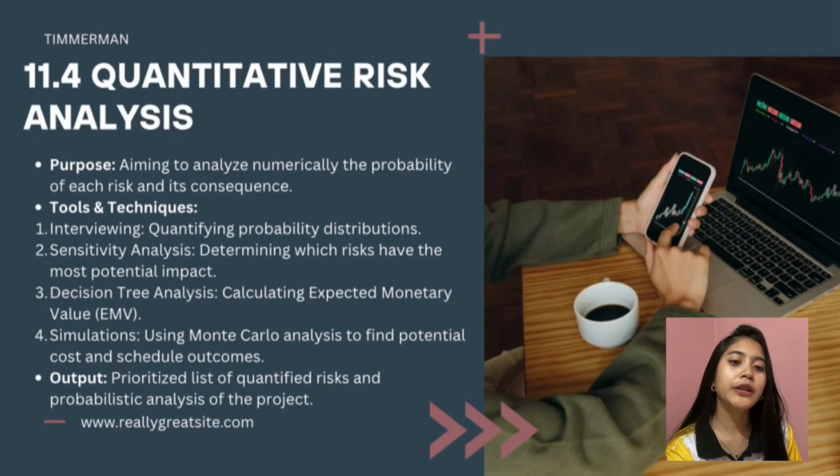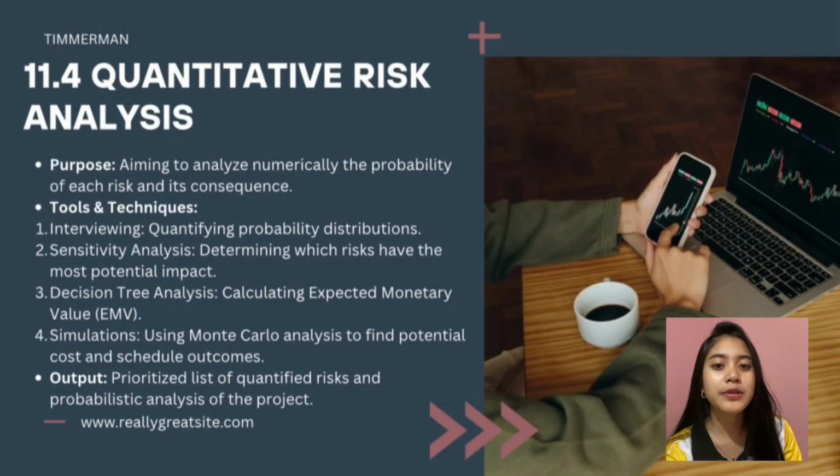So particularly Monte Carlo analysis, this method uses computer simulation to run thousands of possible scenarios based on different risk variables. So it helps estimate the range of possible project costs and completion dates.